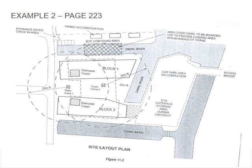In Proposal One, there's one fixed crane on each side — one with a 25-meter jib radius and one with a 30-meter radius — and they overlap. The crane located within the basement area will be used for all operations in that zone. Once construction around the crane is complete, that crane is taken down and that section is filled in later.